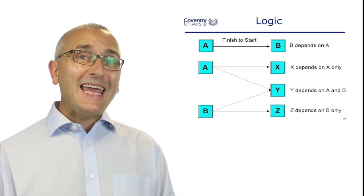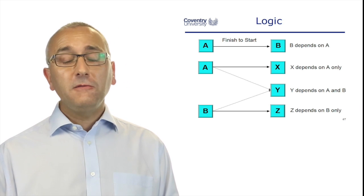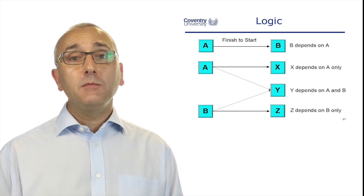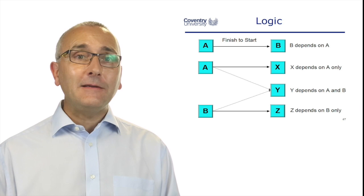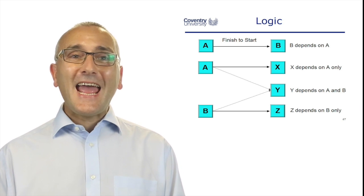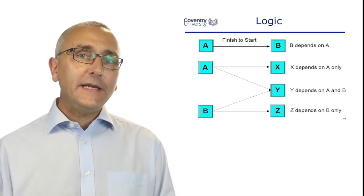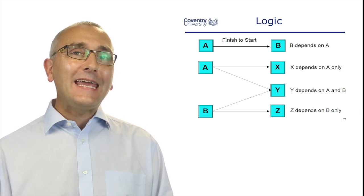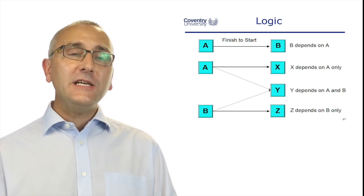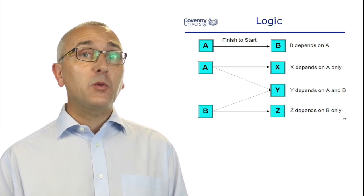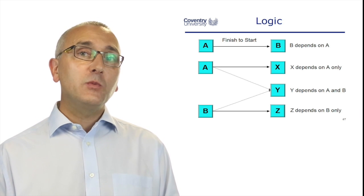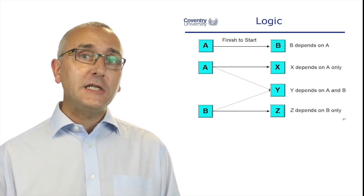This is the logic we're going to use. In the first example here, task A has got to finish before task B can start, so B depends on A. Task X depends on A, but task Y cannot start until both A and B have finished. If A is finished, we could start X, but we cannot start Y because we have to wait for B to finish. The dependency for Y is it depends on A and B.